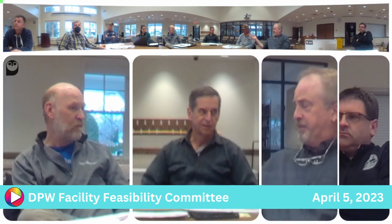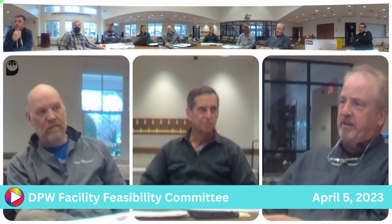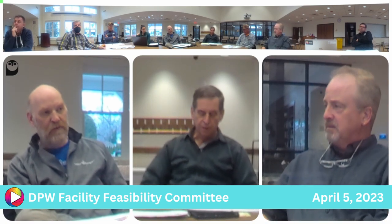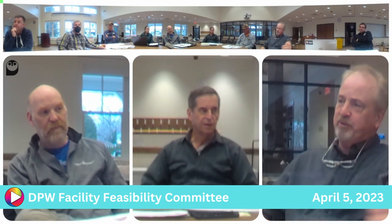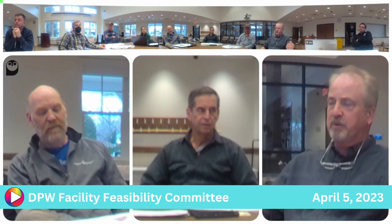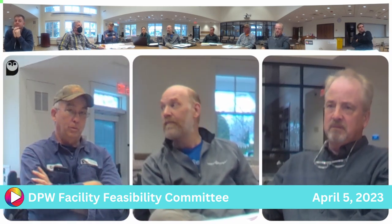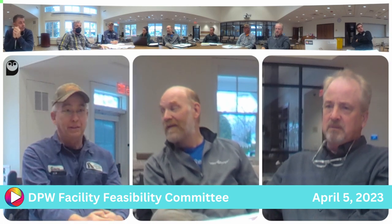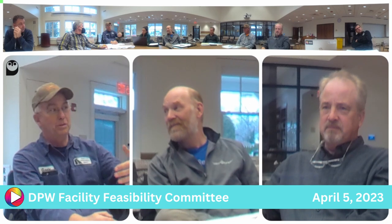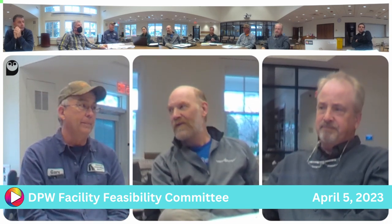Well, to me, that's the point. The farther down the design road we go, the more accurate our estimate is going to be. Correct. And the question is how much do we pay upfront to get to that level? Right. What level of accuracy are we comfortable going in with? Yeah, that's exactly it. And if you get to that point and go to the vote for the money, now you're pushing it further and further out, which means you've got to keep adjusting that. Right. Well, we do take into account escalation as best we can.